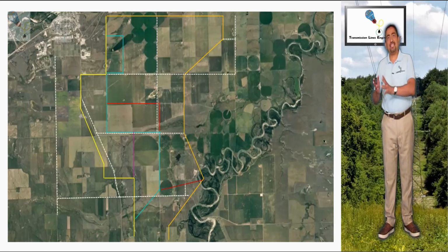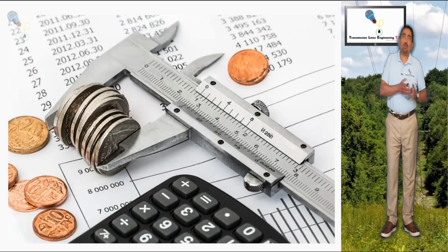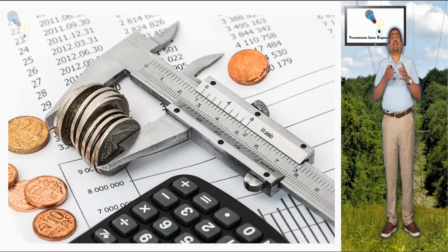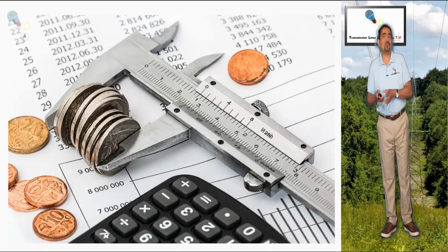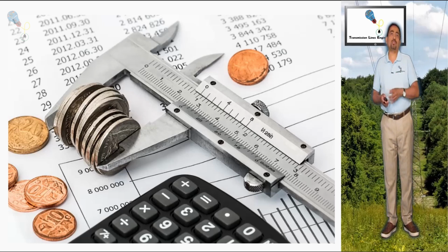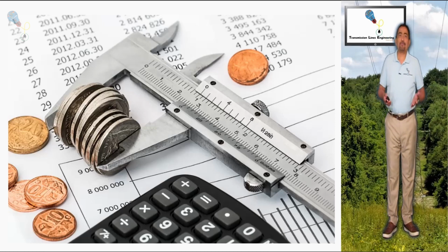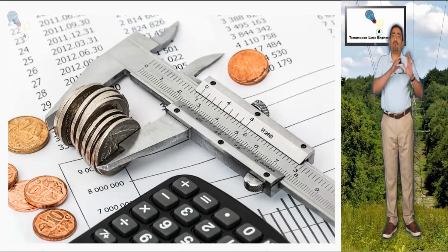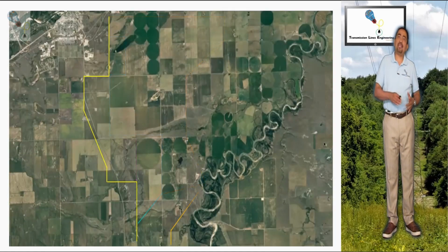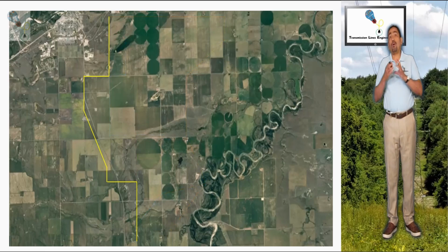The areas of engineering and construction will send their quantities to the purchase area to put together a price analysis to determine the approximate cost on each possible location or each possible route, and send the customer the cost of each one of them. As a step number 5, the client will inform the contractor of the final path to follow after having made the analysis of cost and permits of the final path.